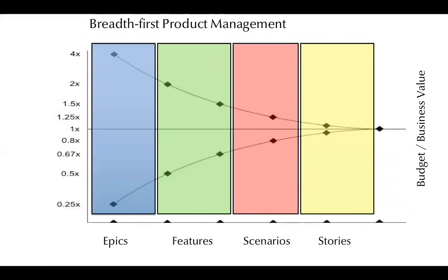Yes, yes. So in release goal land, we have a way of saying, well, we would like to look at this in terms of the assumptions we're making. If we do the work we need to on the Epic end, on the Pirate Canvas end, then we know what assumptions we've got. Let's build a release before the MVP. We'll call it a RAT. And we're not making up words. You can go and Google riskiest assumption test. And it's a nice way to set stage a whole bunch of little releases leading up to an MVP, and each of those releases can have some actual business value in its own right.